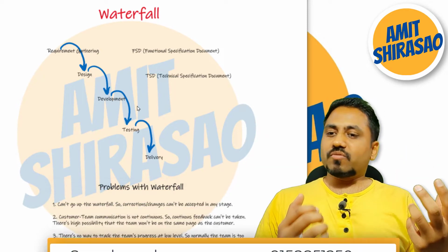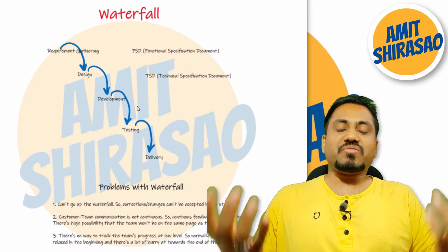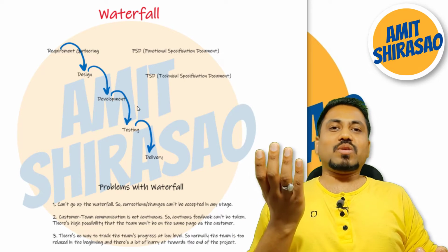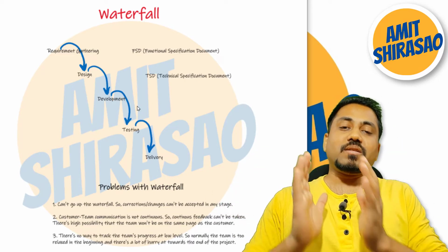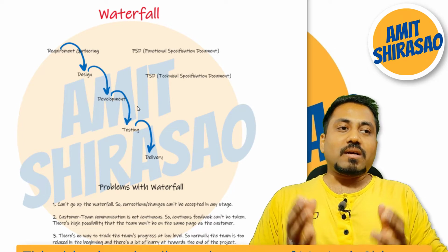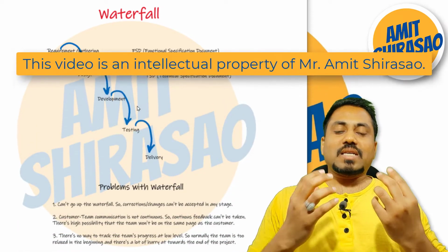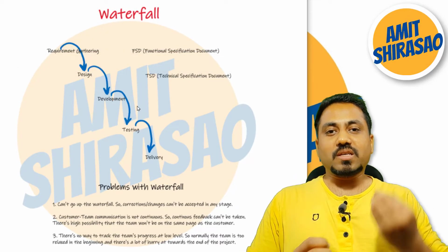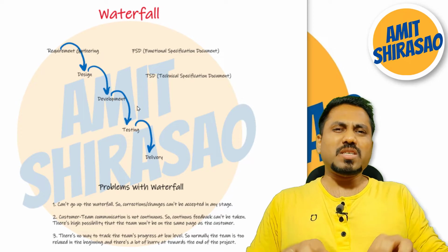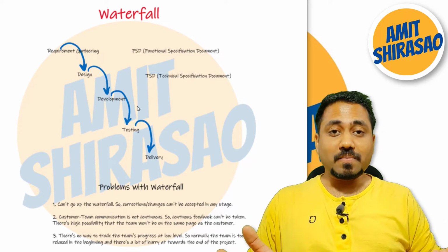So yeah, both of them are big, both of them are black, but these are 2 different animals. So I wanted an elephant, you gave me a buffalo. And it often happened in the waterfall model, because everything that the customer wants in a project is written or documented in the functional specification document. So it is only written in words. Words can always be comprehended in different ways.